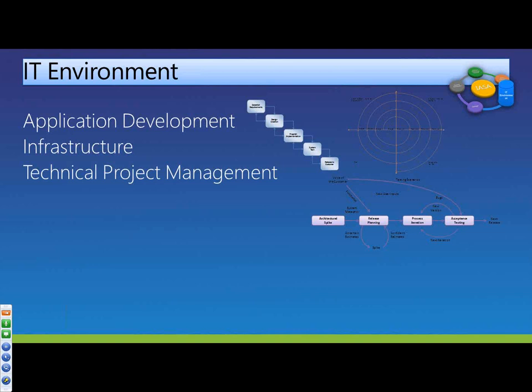He wants to know what technology direction I'm going to give to the team that's about to launch off on a project. Absolutely. He's looking for, are you giving these guys something so new that I've got to extend the schedule? Or are you giving them something they're familiar with where I can go with the previous schedule to know how these guys work? And they're looking for how do you interact on the timeline of things based on what you're throwing at them, what's new, what's reused, and things along those lines.